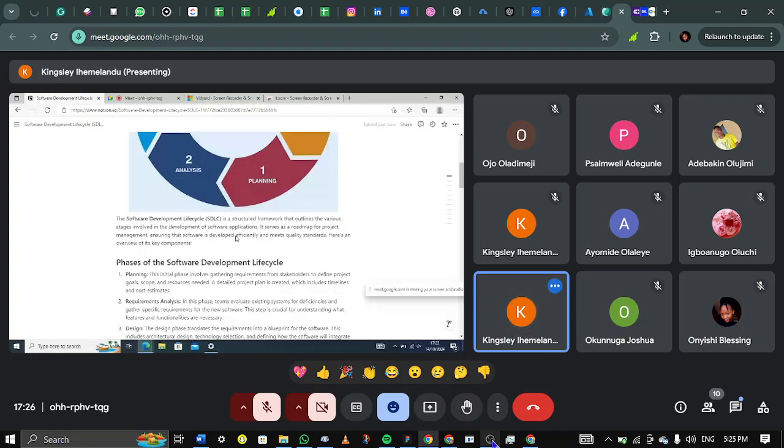So now let's see requirement analysis. Now the product manager has come with, okay, these are the things that we need to complete. That means before you can start a design, you need these things to have been met before you can go to the system design. And before you can start developing, you need the whole system design. So in this case, we are taking the whole requirement analysis, the whole system design, the whole implementation, then the whole testing of the whole application, then you deploy the whole app.